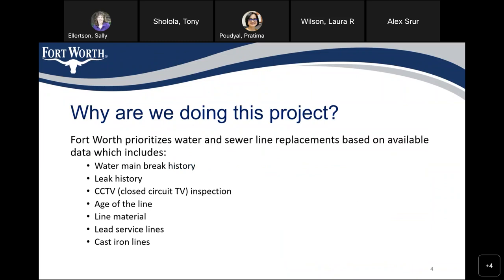Why are we doing this project? The City of Fort Worth prioritizes water and sewer line replacement based on several available data, which includes water main break history, leak history, CCTV inspection data for the sewer lines, age of the lines, line material, whether the line has a lead service connected to it, and whether the water lines are cast iron lines.